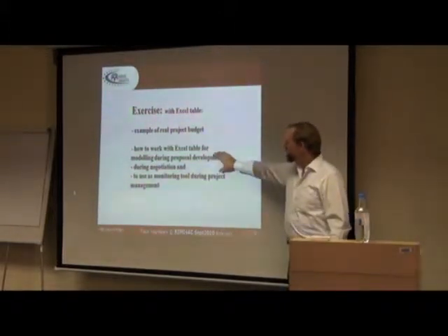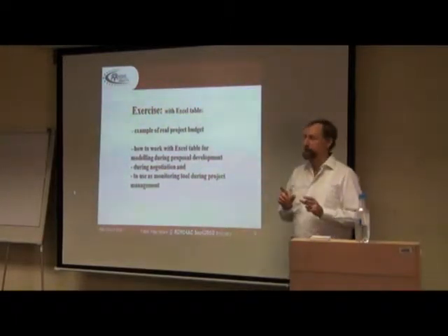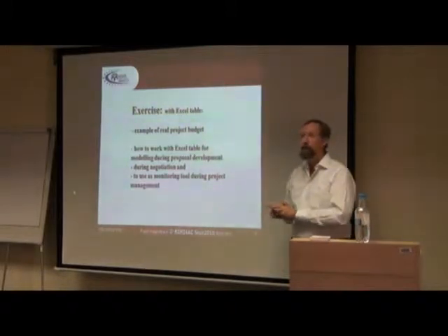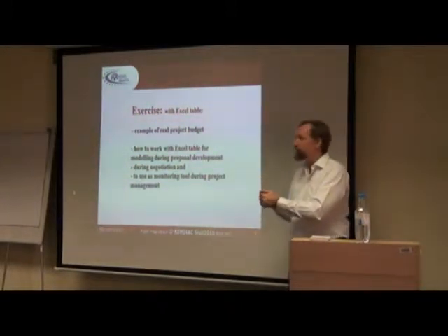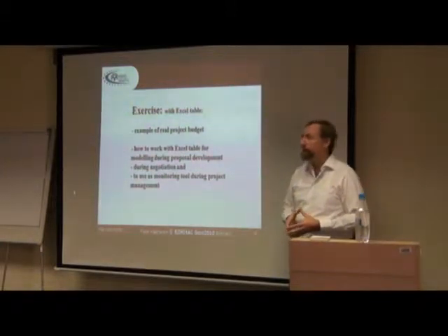You can use the same thing during negotiation. If the European Commission requests changes in the budget before they sign the contract, you do the same thing. You make small changes in the worksheet and the whole summary table is automatically recalculated.